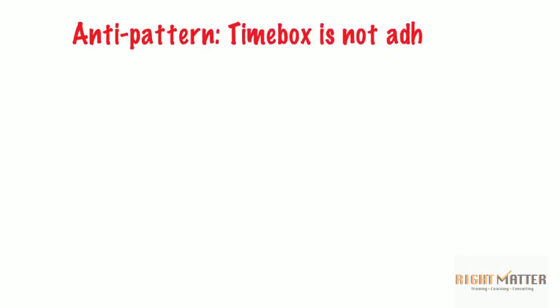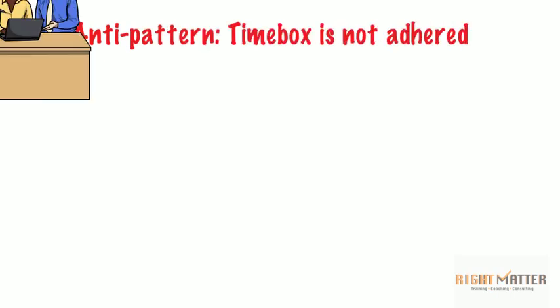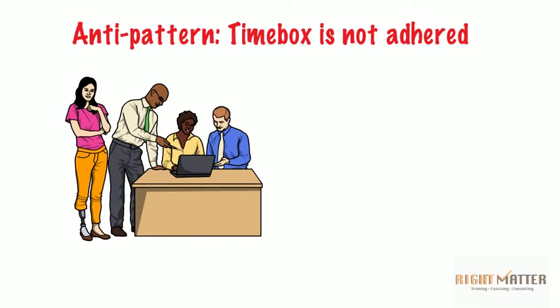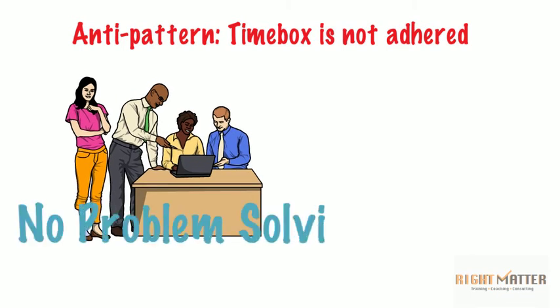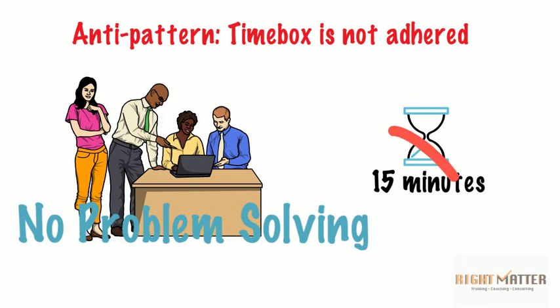Third common anti-pattern that I have observed is when the 15-minute time box is never adhered to. This event is not a problem solving meeting. However, many Scrum teams often use it for the same purpose, and thus the time box is never met.